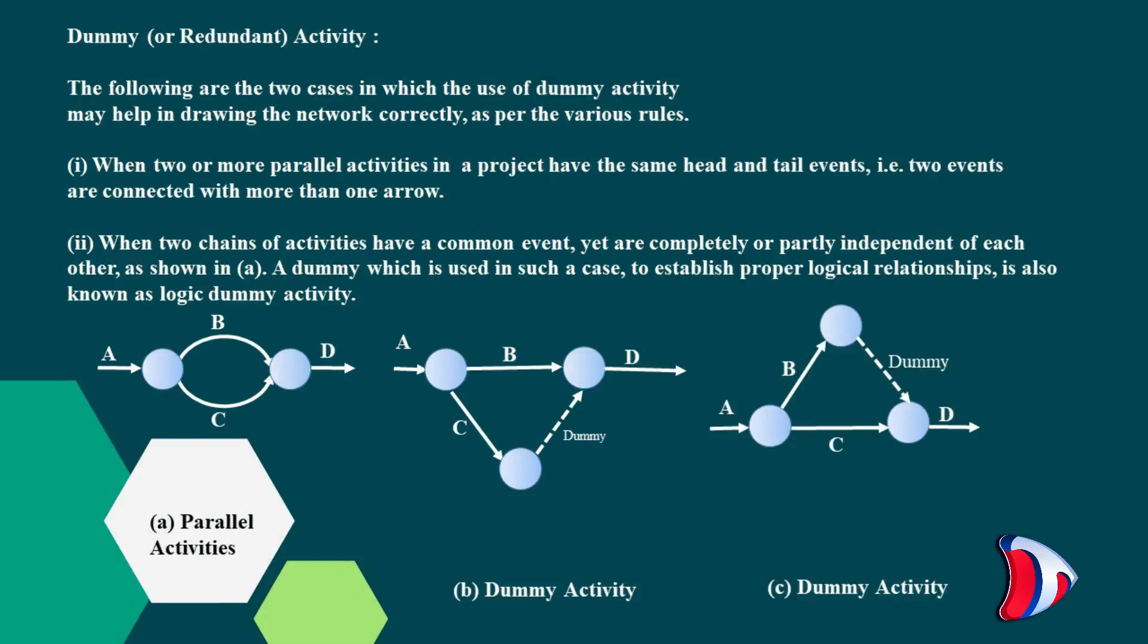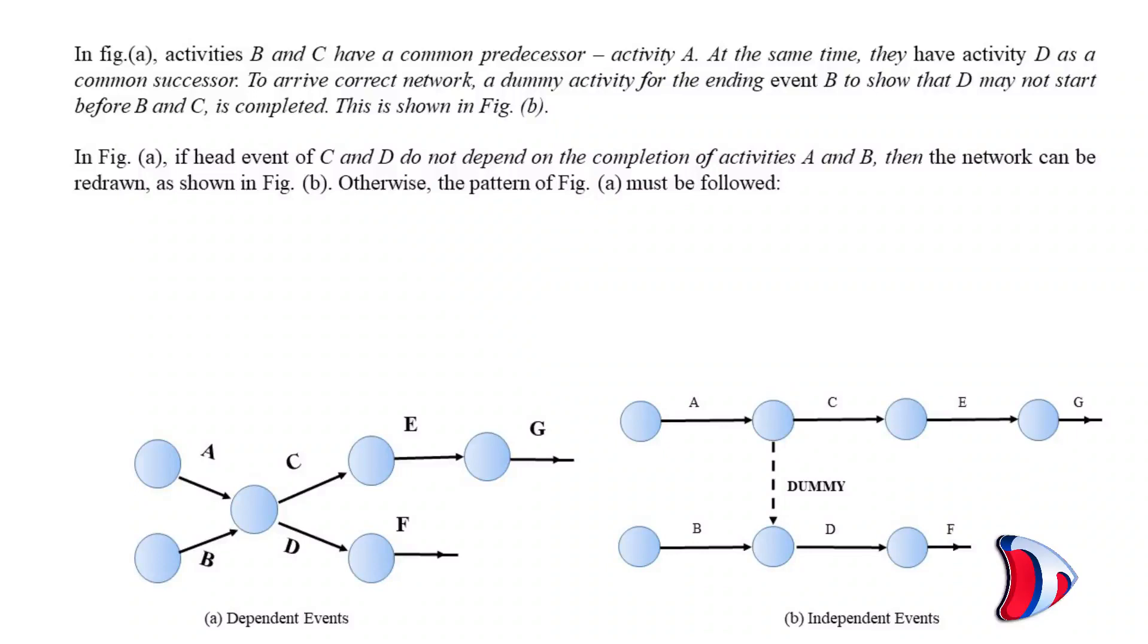As shown in figure A, a dummy which is used in such a case to establish proper logical relationships is also known as logic dummy activity. In figure A, activities B and C have a common predecessor activity A. At the same time they have activity D as a common successor.